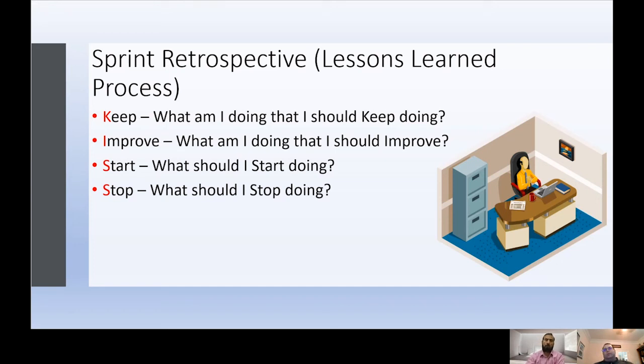And so what I typically do is I'll send out an email and say, answer these 4 questions, not these survey instruments that have hundreds of questions that people don't feel like answering, that are very constraining. When you ask these 4 questions, people tend to answer where the heat is, and they're willing to answer these 4 questions. So I get the answers back in an email.